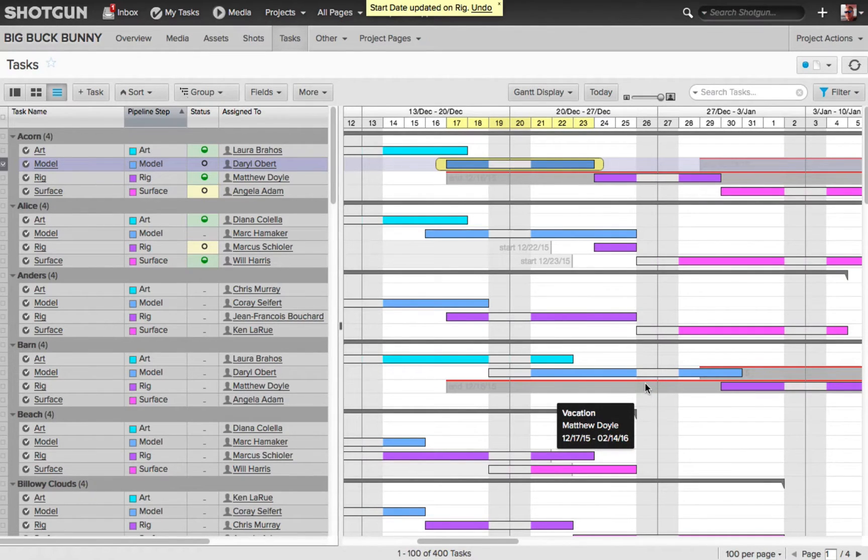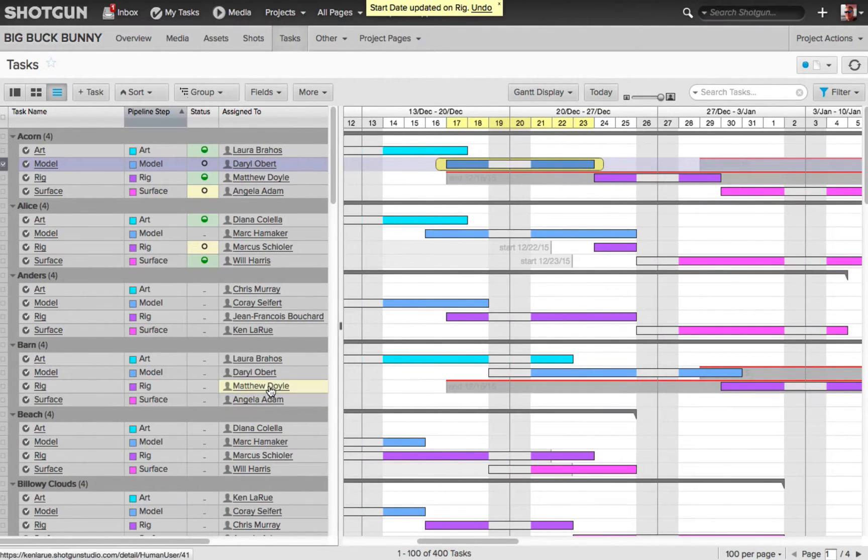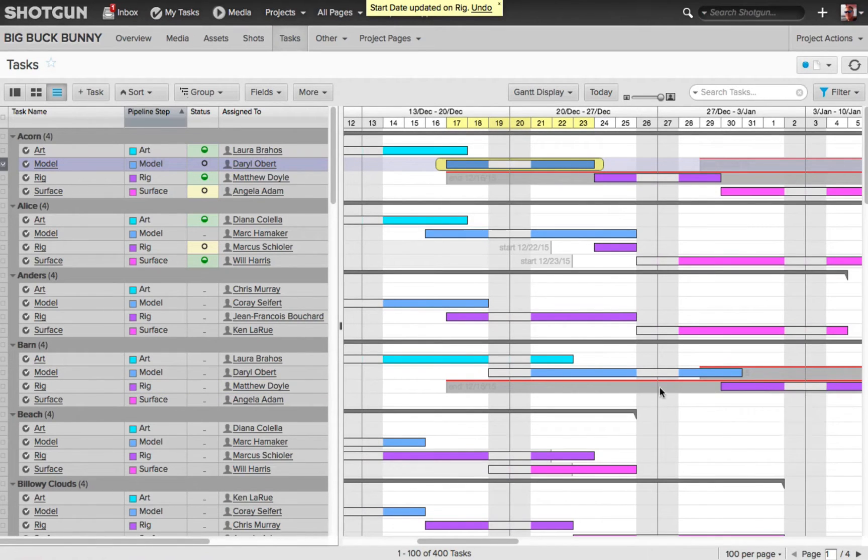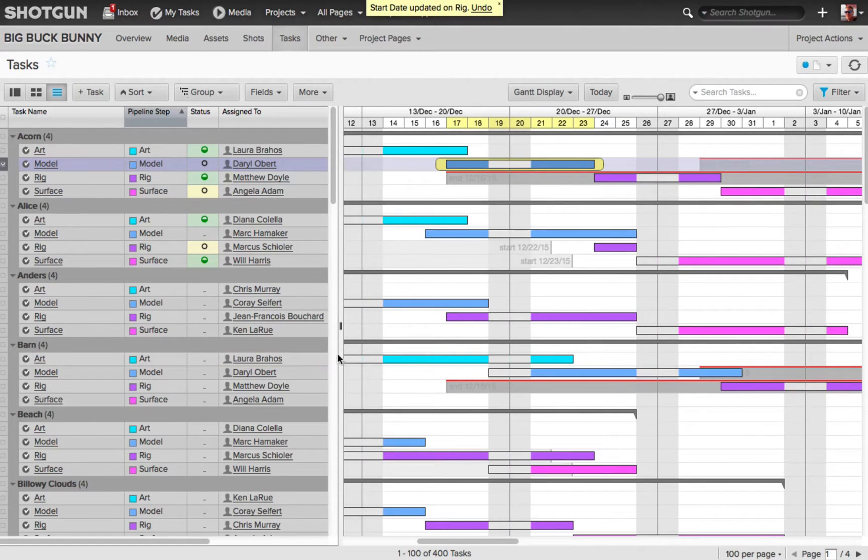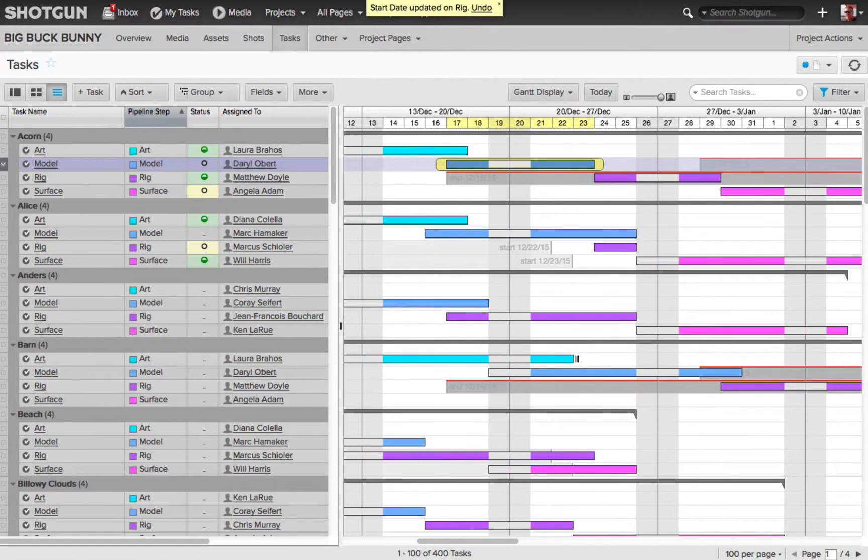I'm looking at this, and I see that I've got Matthew scheduled to be doing the rigging the same time he's on vacation. So what do I need to do? I need to assign that task to someone who's not on vacation.